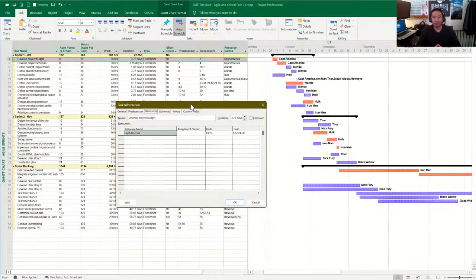We're opening up Microsoft Project and manipulating the numbers. We're always asking, is this what you want? Is this realistic? Can this resource be committed to 2 tasks at 100%? So it's always asking questions and trying to unpack the reason why you're trying to commit a resource to a specific task, because each resource is a dollar.